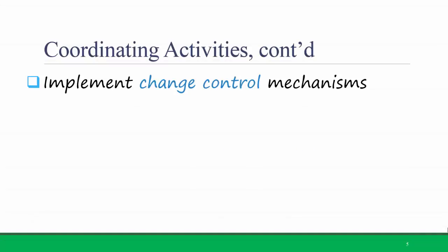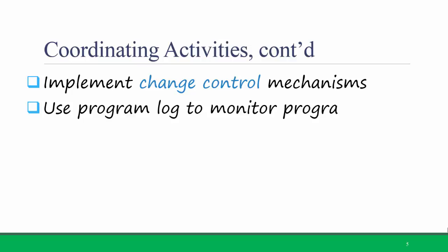Another good tip is to implement change control mechanisms. This means that if you have a large project with multiple programmers working on it, you don't want them to override each other's work, so you need to make sure that the code can be checked out and checked in by a programmer as they make edits on it. You should also use a program log to monitor program changes — being able to see who made changes, at what time they made those changes, and what those changes were. One popular tool for managing code, including change control and program logs, is GitHub.